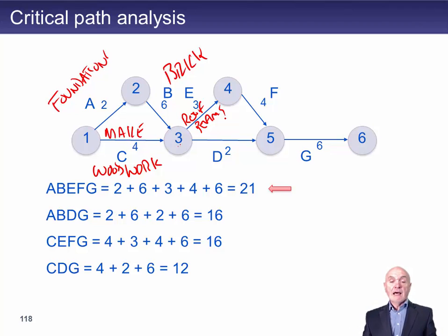And also the bricks are up, but there are holes left in the walls where we can put in the windows and the doors. So I'll put here W plus D, windows plus doors fitted. So our woodwork has been done in this joinery factory, and now we're using the woodwork to put the roof beams on top of the bricks and the windows and doors in the holes in the bricks. And then F, this is putting the roof covering on.